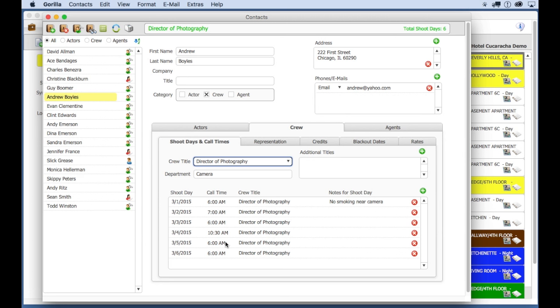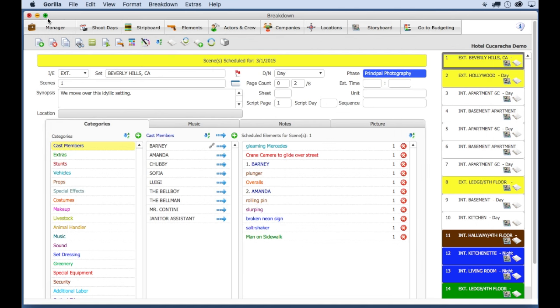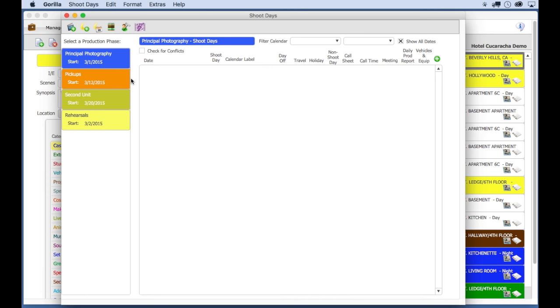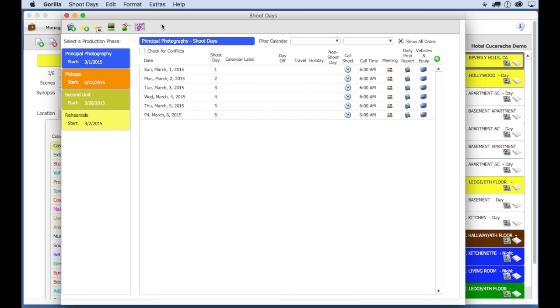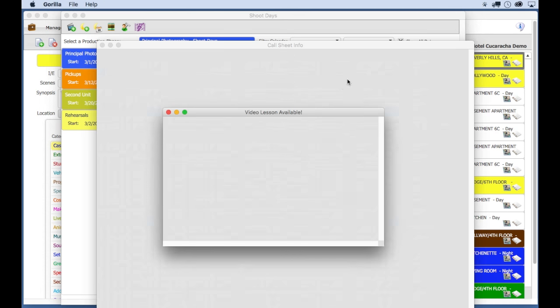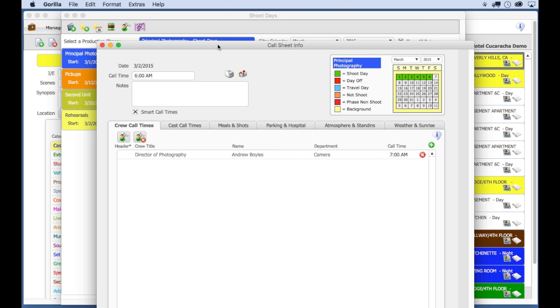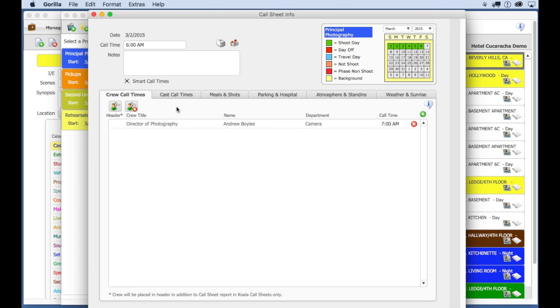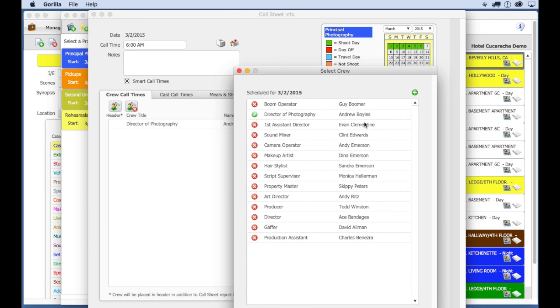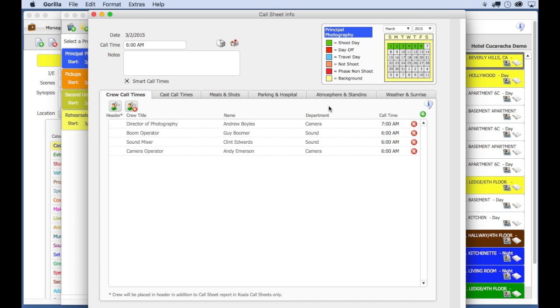So when you are ready to schedule crew for a shoot day, you can do it here in the contacts module. Or you can go to the shoot day. For example, let's go to the second shoot day and click on the call sheet button. And you can see here is the DP, scheduled for this day. But let's add a few more crew members to the shoot day. And then, you can change the call time for each crew member here.